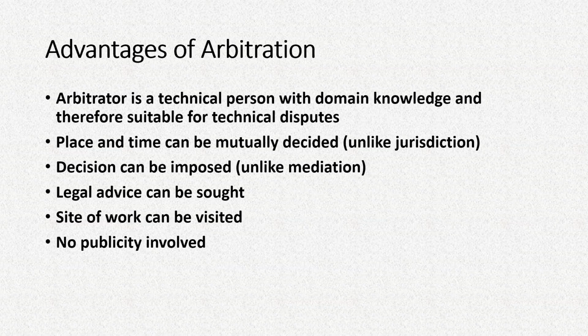And legal advice can be sought by the arbitrator, because sometimes if the issues escalate a little bit, then it may not be under his or her expertise to resolve those kinds of issues, and additional help can be sought from some other lawyers or experts. Then the site of work can also be visited. That means actual evidence can be examined on the site.